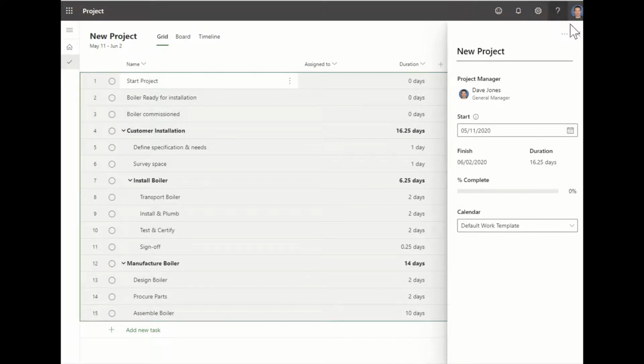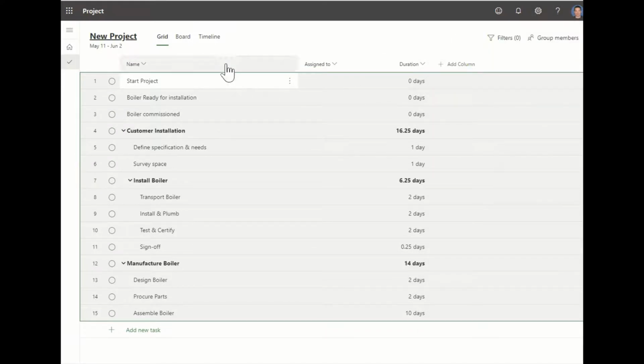The final step is to clean up the project. Select all activities and set them to 0% complete. If this is going to be a model for a new project, go through and adjust the durations and update assignments or add new assignments. If you're using this as a template, go through and remove assignments. Remember that any assignments you leave in here will show up in your Power BI reports.